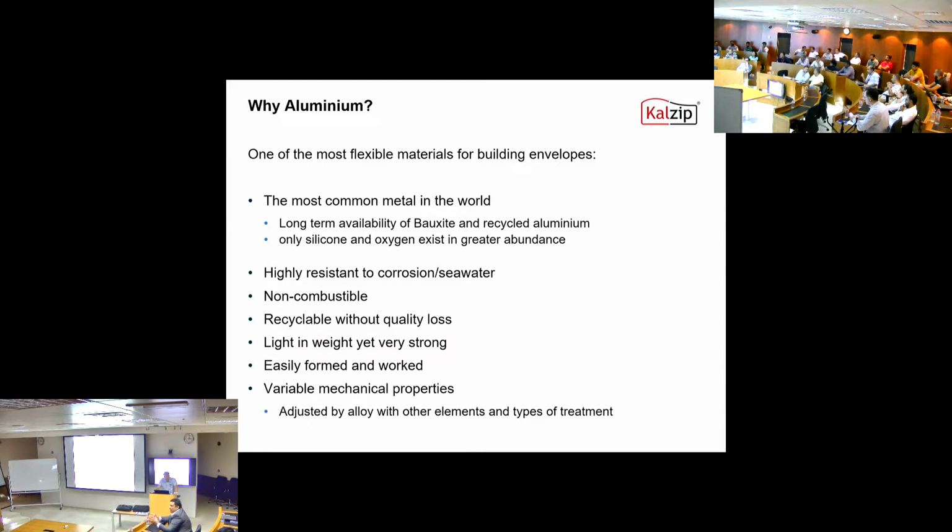they separate between local companies and foreign companies. A local factory will get the number, you will give it to the DM, and they immediately approve. What we do in the submittal is we put the FM approval and the COC, which is signed by FM, in the format of the civil defense, and we give it as a submittal. They will process it and approve. The only difference is that this one is immediate, and this one needs a submittal along with the other submittals.